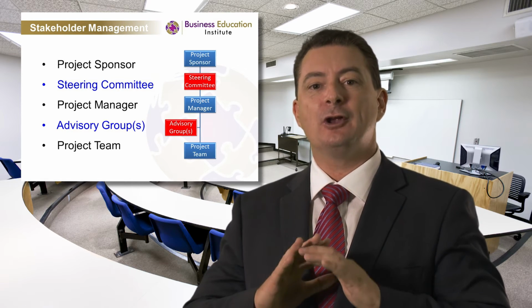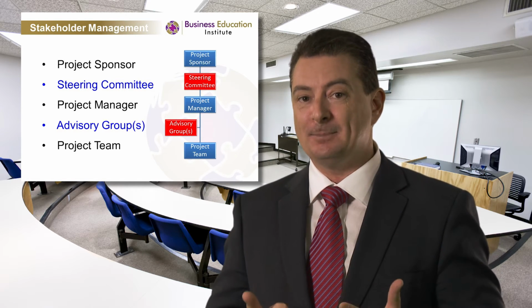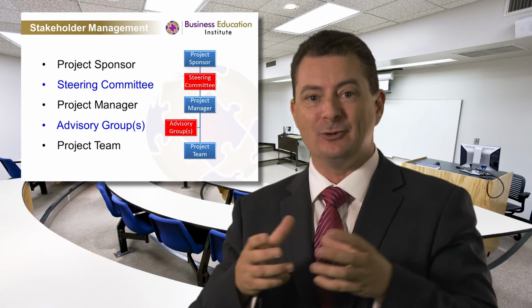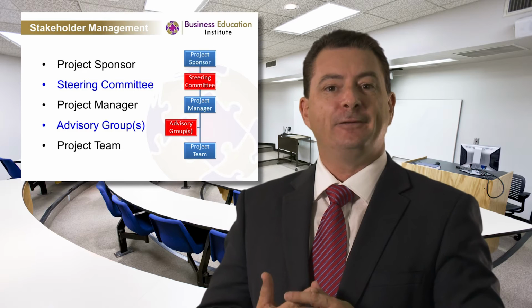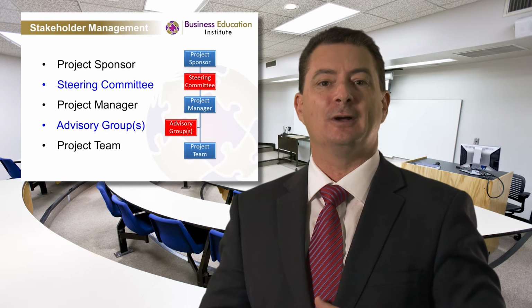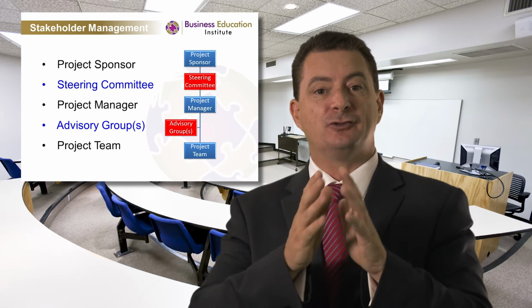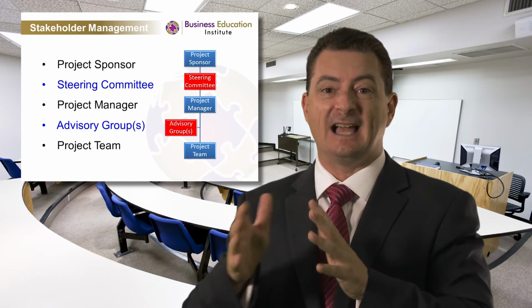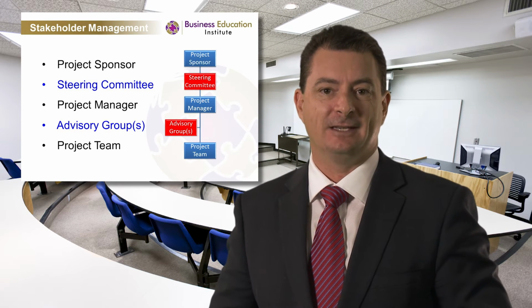In fact, we don't necessarily want a steering committee, but in the event that the project is highly political, where we need to bring in the political powers of key people with influence, you would have one. If it was a project across the whole organisation, and therefore you want a representative of each of the directorates, or if it was national, each of the states, or if it was international, each of the countries, that would be a good use of having a steering committee.